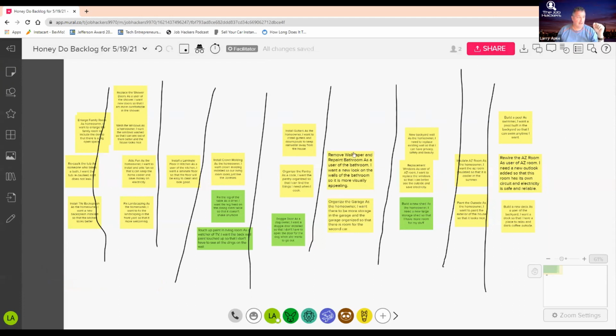Right? I know I'm looking at my team members and I see they're shaking their head. Oh, I think there's something in the wrong place. But we're not going to do that. You're not going to move them yourself. So what I might ask the next question is, if you see something out of place, something that's in the wrong column, you can't move it yourself, but you need to convince either the team, since we're all online, that it's in the wrong place, or you need to convince another person if we were in a group. So you have to convince at least one other person.